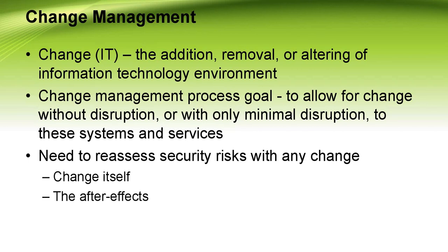There are three change types generally accepted within information technology. One is a normal change, a change that must go through the change approval process. After approval, they go from design through operations. Replacing the HR system from one vendor with another vendor's system is an example.